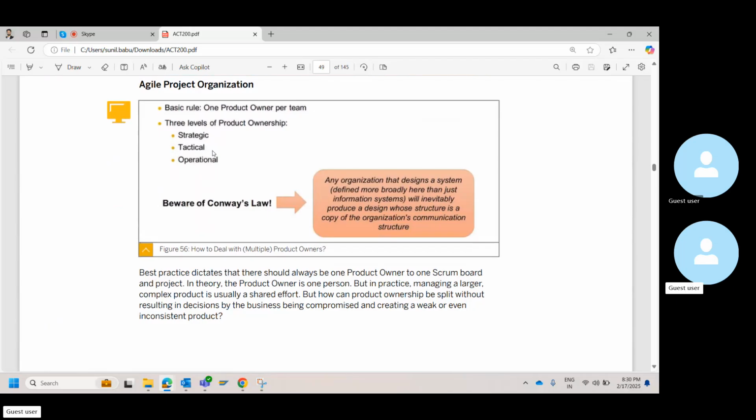Someone will come and inform you. And then there's one more level of people wherein they'll say, as part of this process, A, B, C, D should be the process flow. I want to see this process in the system. So there are 3 levels. This can be the project sponsor, this can be the project business process owner, and this can be sub business process owners or key users in an SAP project.